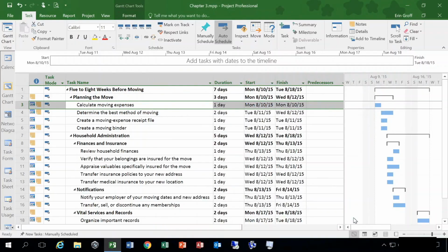At the bottom of page 40, it talks about task links. When you link 2 tasks together in Microsoft Project, you are creating a dependency between their start and finish dates. Dependencies drive the project schedule. A task's predecessors are the tasks which drive its schedule, while its successors are the tasks which are dependent upon it. Every change you make to a linked task will affect its successors and its successors, say that 5 times fast, and its successors' successors, and so on.